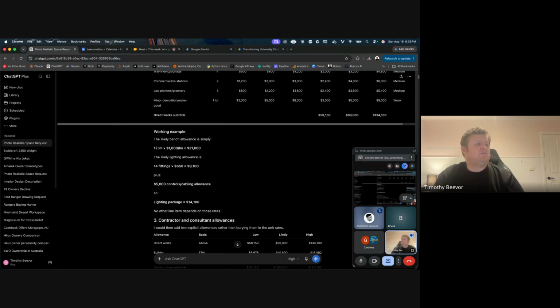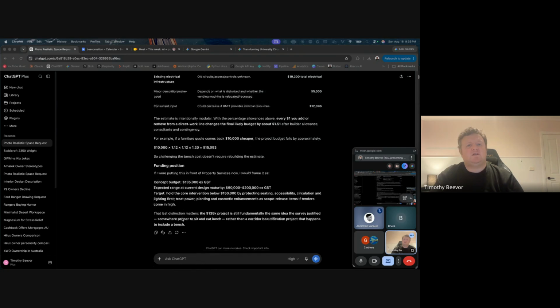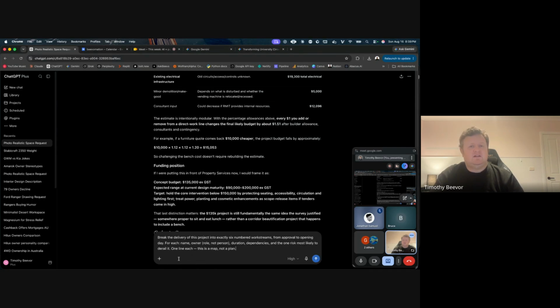But so once I've got the budget, then we do the project manager thing, and we say, break the delivery of this project into 6 numbered work streams from approval to opening day. For each: name, owner, the role, duration, dependencies, and the one risk most likely to derail it. So 1 line for each.